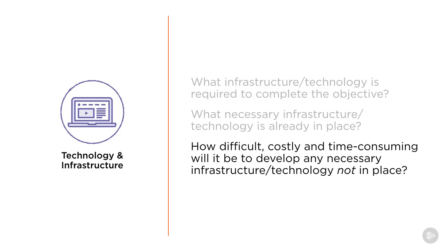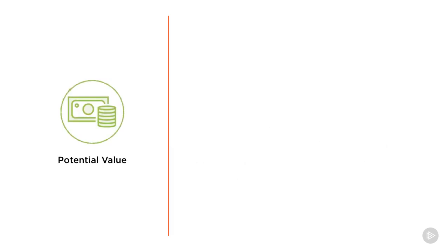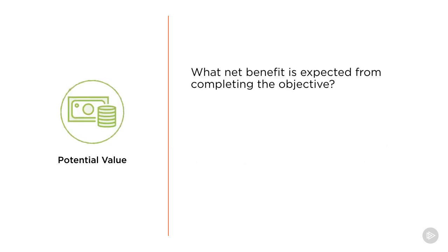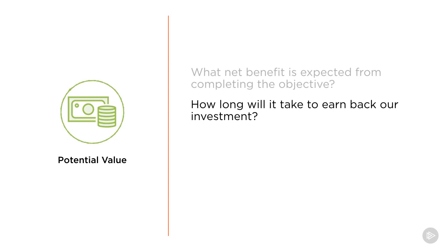This all leads inevitably to potential value. What's the net benefit that can be expected from completing the objective? Not just the amount of benefit that we expect, but the amount of benefit less the cost and labor and expense when it comes not only to money, but also focus and strategic resources that were required in order to complete the objective. How long will it take us to earn back our investment? Even if the payoff could be huge, if it's going to take too long, it might not be in the best interest of the company.